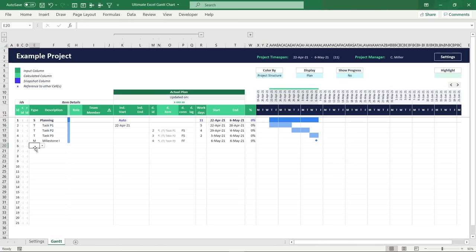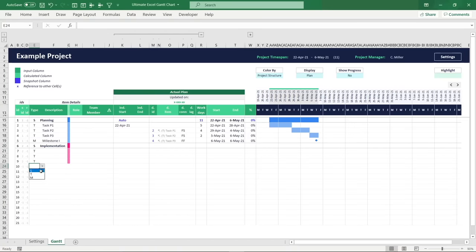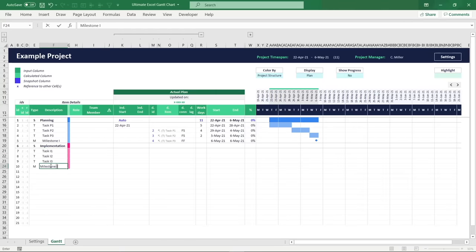Any new task or milestone item you add below a stage is instantly assigned to that stage via an automated stage ID system. You can also quickly create a new stage with its own items. Notice how the whole area and item names are automatically formatted and structured based on your selection. With this dependency engine you are not limited to creating dependencies within a stage — you can also make stages dependent on other stages.